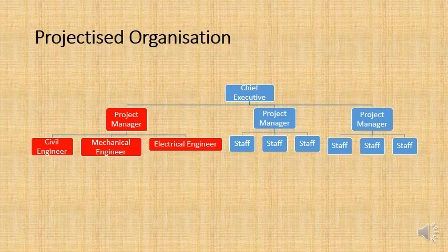Now, a couple of issues with this is that obviously everyone involved in the project needs to be completely full-time in this project, and so it needs to be a pretty big project to justify this. An example of a project where we did this: I've done this on 3 different occasions in my career, and the project price ranged from 20 million to 120 million US dollars. They tend to only do this with very large projects.